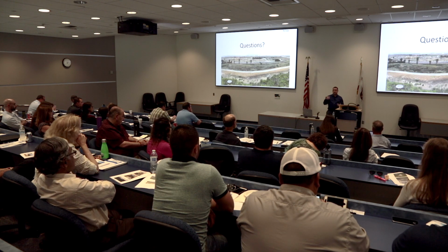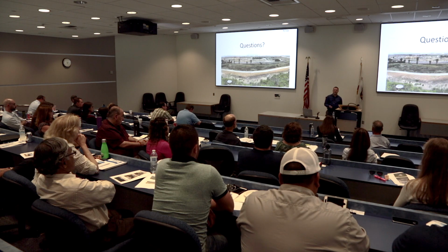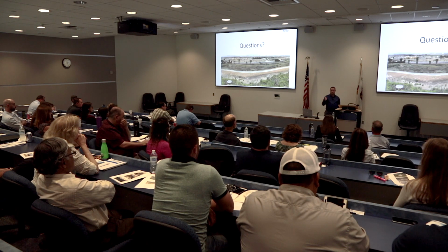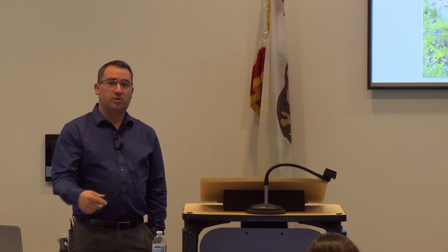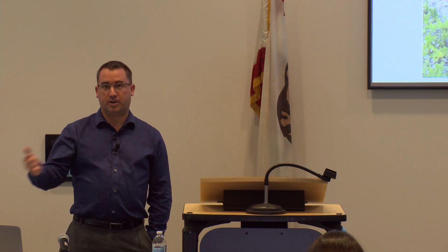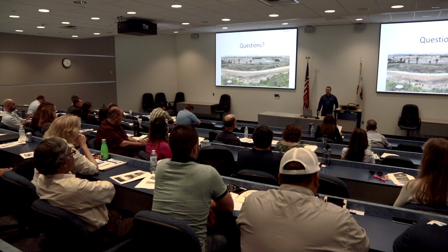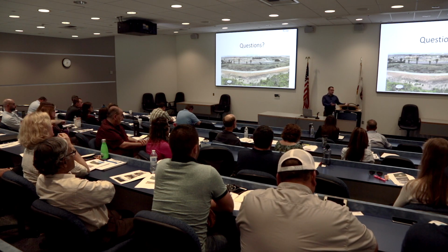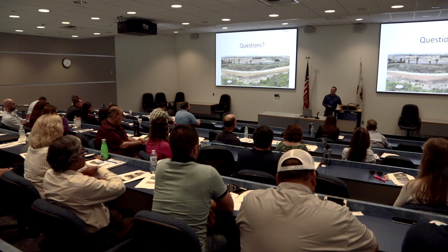And when they took the perk rates, they were perking probably right over one of those concrete channels, these little underground tunnels. Sure enough, the perk rates were great. Lo and behold, they overexcavated the site when they came out and graded it for the whole site. Then they ran into all of these underground tunnels and said, hey, did you know all this was under here? And we were like, yeah, we did. We told you about it.